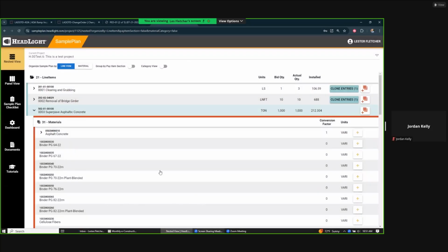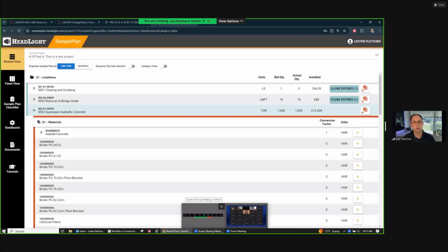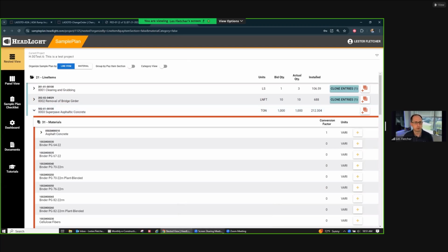Yeah, thanks, Jordan, for that. So what you need to remember is the initial sample plan is the base stuff that we're trying to collect. You're trying to inform the contractor, hey, these are the things we're trying to sample. And it's basically an agreement between the PE and the district lab: hey, we think this is the base of what we're trying to get. And so I think that's the advice. Yes, there's no way you can be exact at the beginning of the project. There are some things, like how many sacks of dirt do I need? Well, if I've got 5,000 yards, I know I need 5 sacks. That's not a big deal, but I see exactly what you're saying.